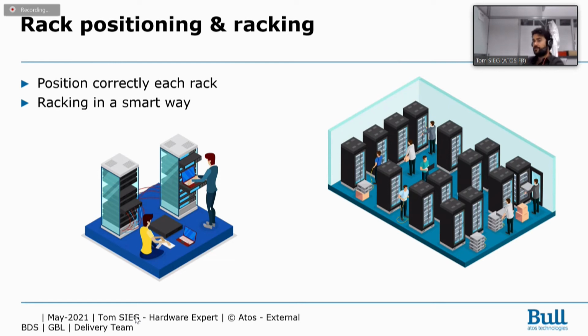Yes, also be careful about the aesthetic aspects. Like I said before, the doors, the side panels, all the aesthetic parts could be damaged and could disturb you during the installation. So it's the last part to put in place.